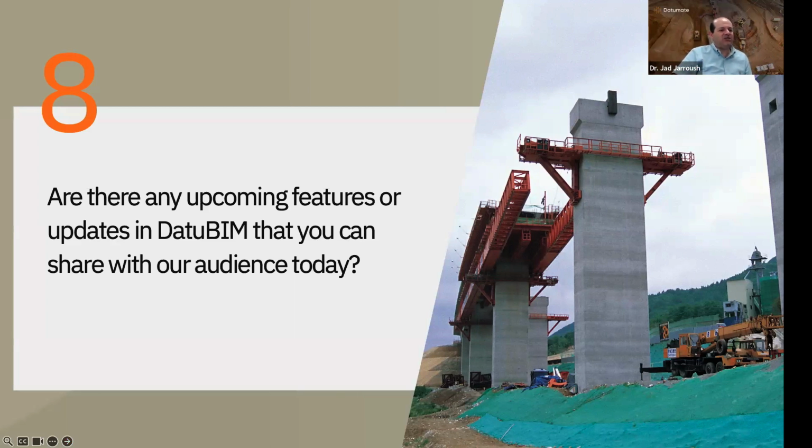These enhancements will help managers identify and address various construction issues during projects. For example, a user can add data reflecting the construction status of each geometric element during the construction, such as a wall or a part of a bridge, and easily connect the design start date and design end date of the element, and additional actual start and actual end dates, and all the time compare between those dates. Those features highlight elements that are behind schedule or meet the schedule.